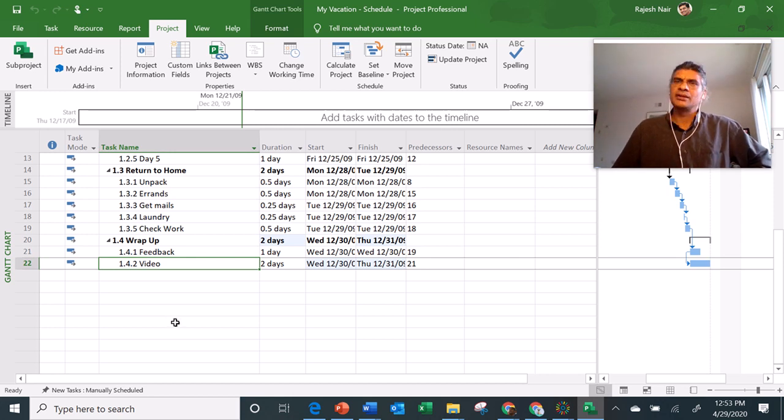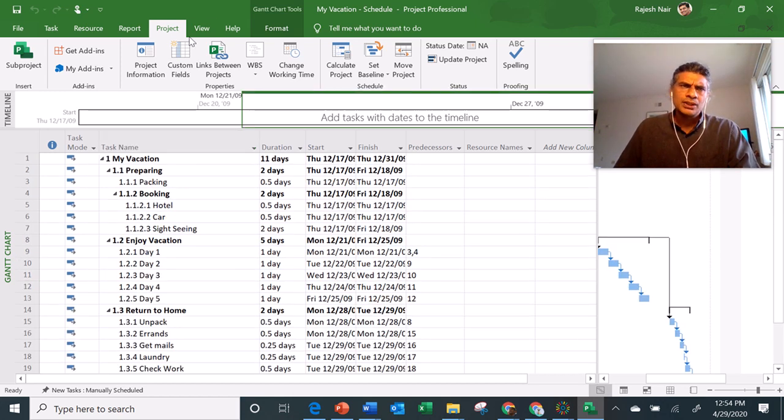Today we learned about WBS, decomposing the project into smaller chunks of activities, and for each small chunk we do estimations, and that will give us the duration. We also build the relationship between tasks, which is by networking or sequencing within the Microsoft Project tool. We build the predecessor relationship. Once you do that, we can make sure you build all the activities and hit the auto schedule with the project start date. That will easily spit out a project schedule. We also learned about the critical path.